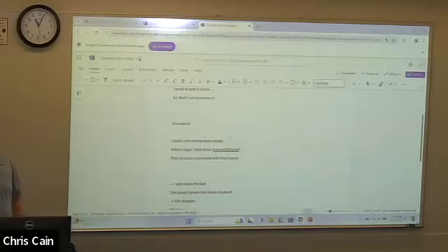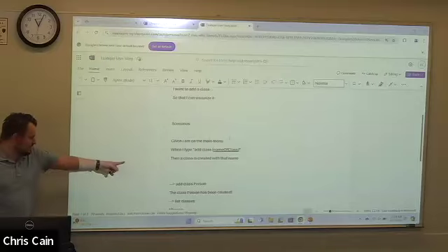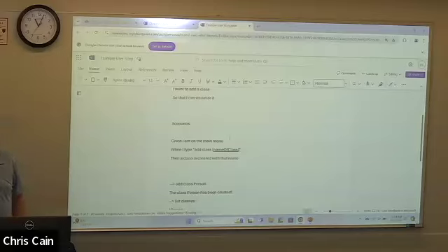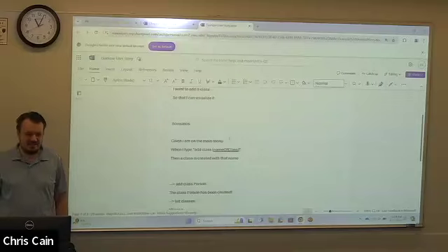Note that this is still not technical enough for implementation because we don't know what it means to create a class with that name. What data structure are we using? What is storing this? How do we access it? None of that is embedded within the scenario. That's what's going to become the task.